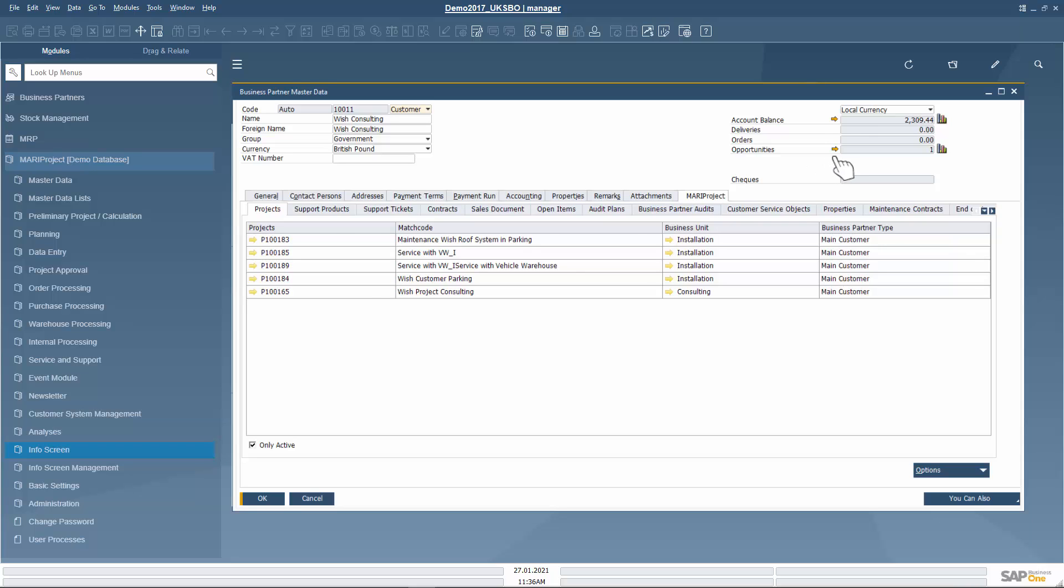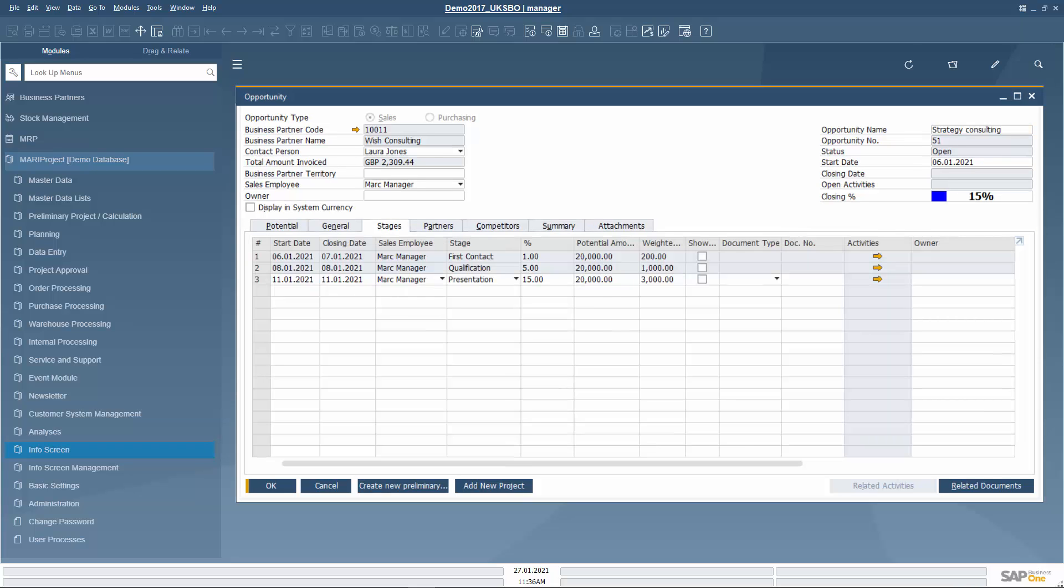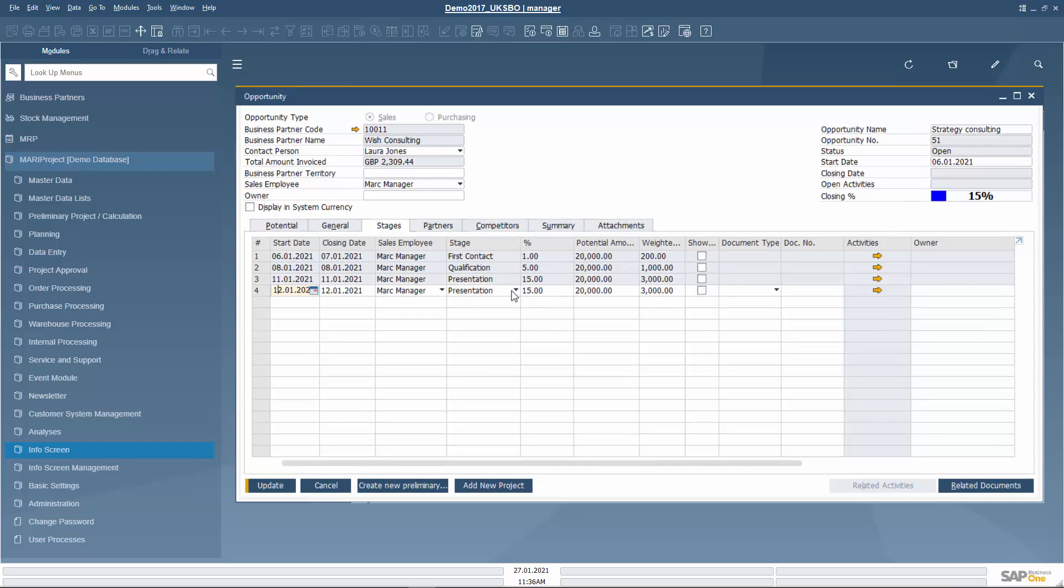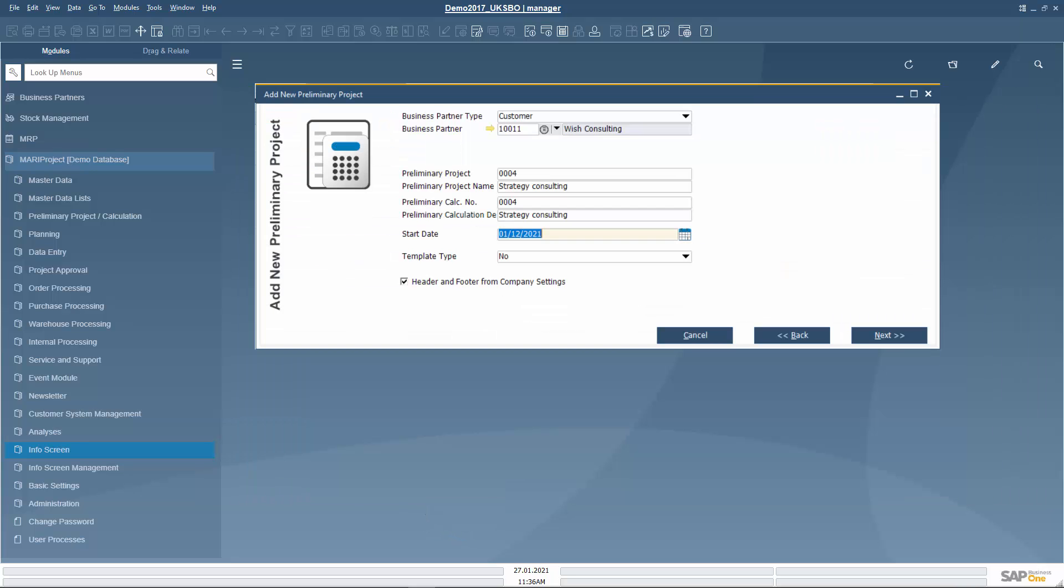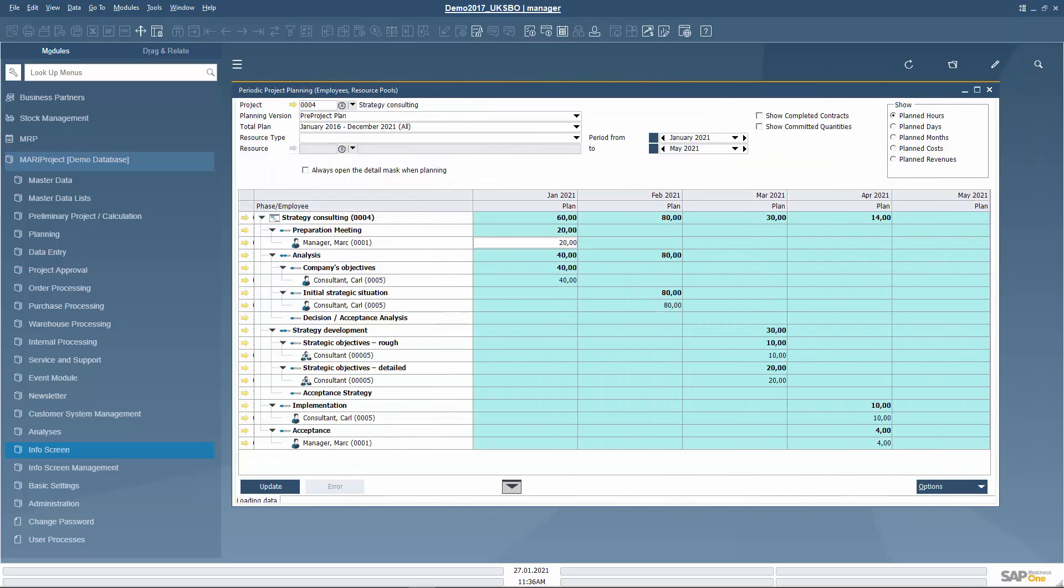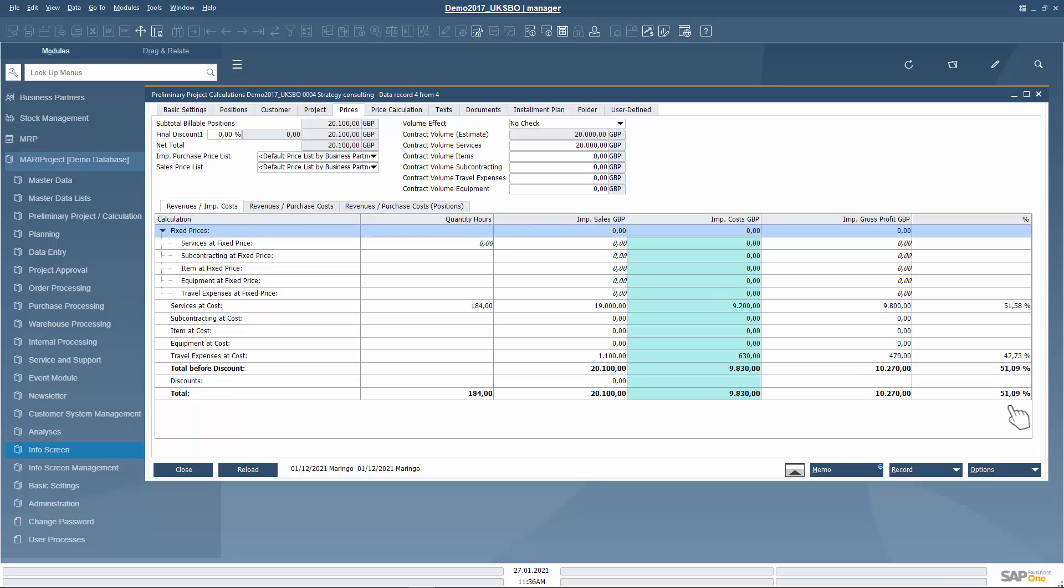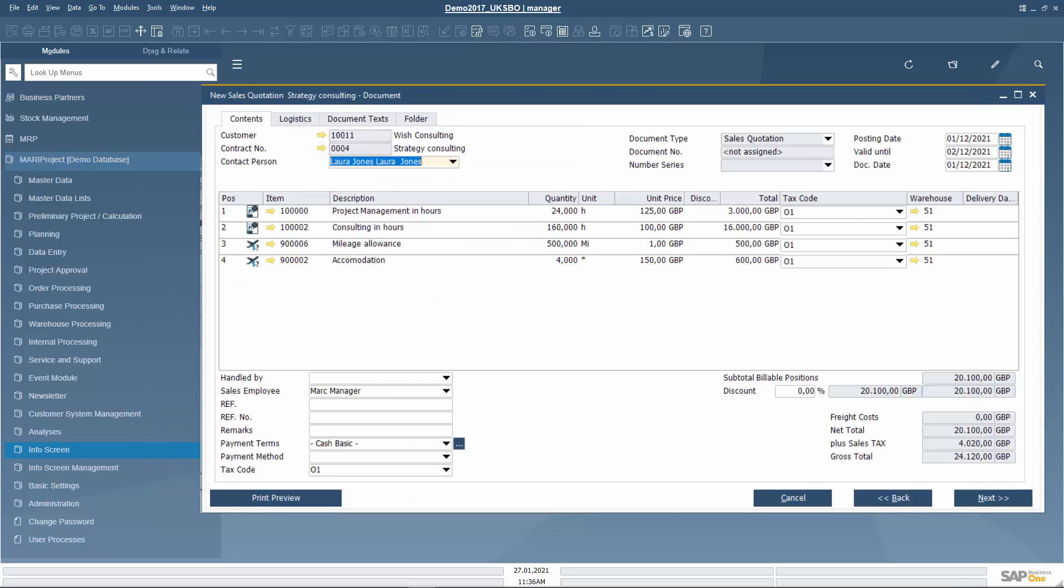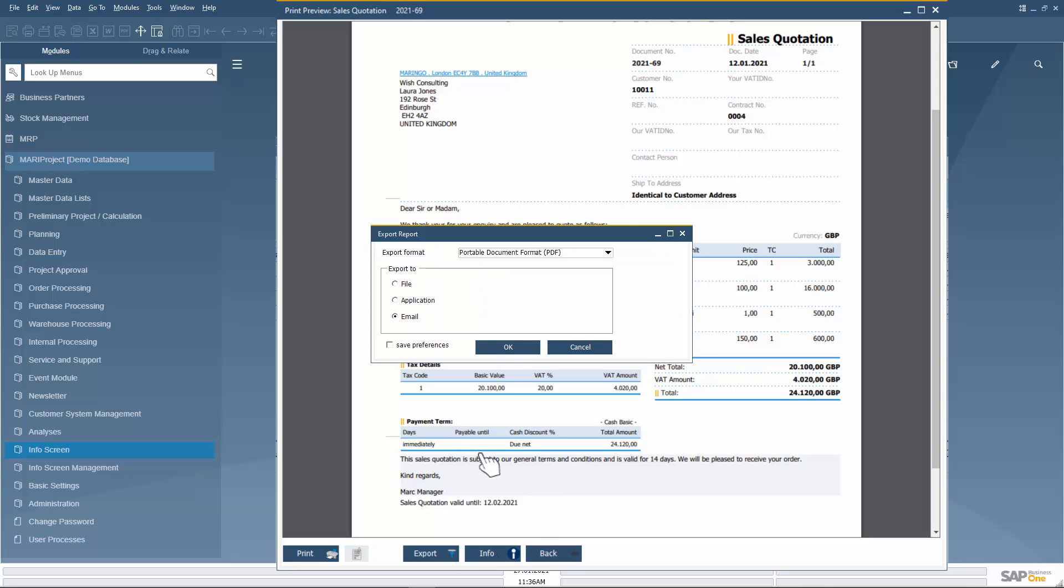During the phone call, Mark is informed that he can submit a sales quotation to Wish Consulting for strategy consulting. He changes the status of the already created opportunity strategy consulting to sales quotation and creates a preliminary project with MariProject. He roughly structures the project into phases and uses experience values for the duration. To this information, he adds travel expenses, checks the profitability, creates a sales quotation and sends it to Ms. Jones via email.